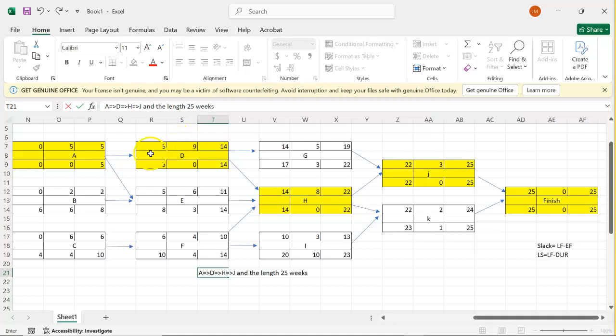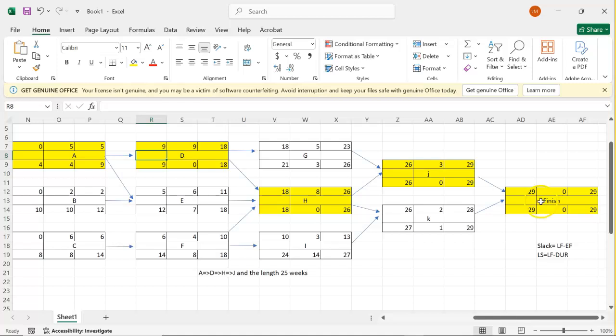If a project on the critical path is affected, then all the projects will be affected. So for example, if D is delayed by 9 weeks, all the projects are affected, even the ending finishing line is changed. But when you look at, for example, E, if it delays by 9 weeks, it has no impact on the critical path. So you need to look at the projects that are on the critical path so that you can finish them. So you see, I changed there, I put 9. Nothing has happened to the project on the critical path.